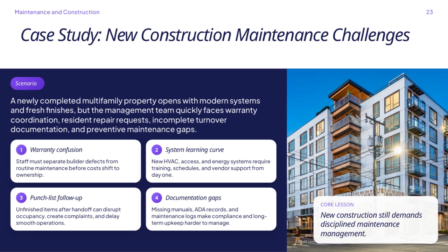The punch list follow-up is another critical area. Any unfinished work that remains after handoff can disrupt tenant occupancy, generate complaints, and delay the smooth running of the property. Staying on top of these punch list items ensures a seamless transition into full operation.